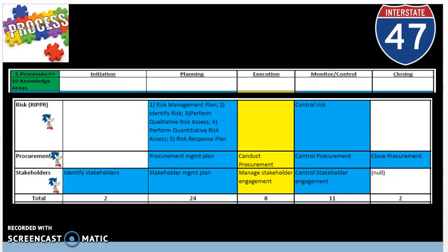After the choice to buy from the outside has been made, the Project Management Office team or PMO will conduct a bidder or vendor conference by sending out procurement documents. These include RFB, request for bid, potential prices of what the price for the service will be from the vendor. Then you have request for proposal or RFP, what they propose to offer. Then request for information or RFI is where there could be multiple information packets that can be given to the buyer in exchange before making the choice. So it's just more further clarification of the services offered by the seller.